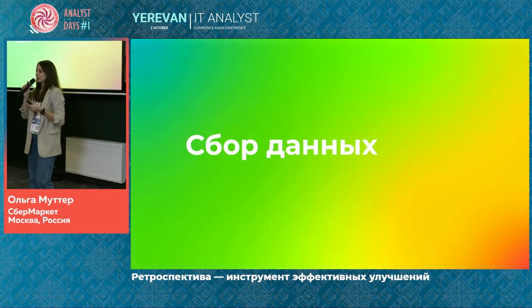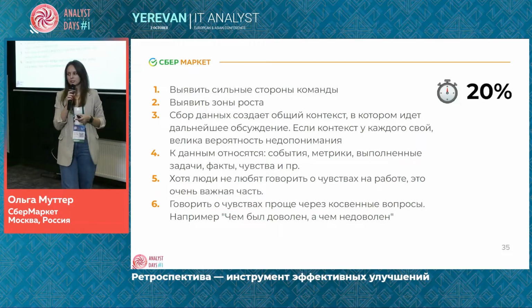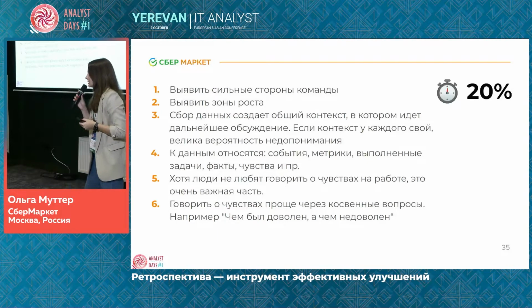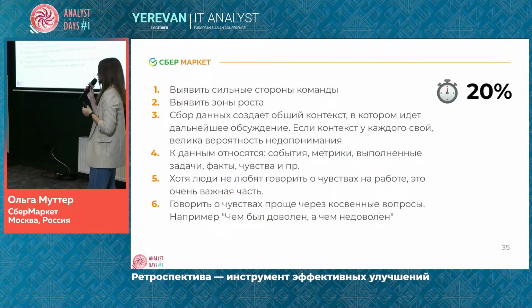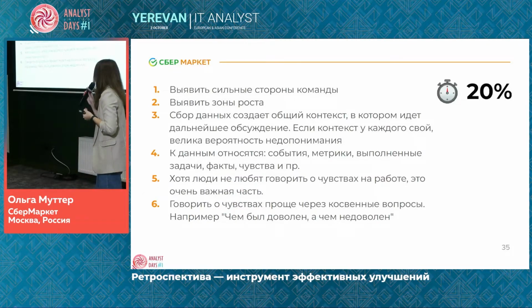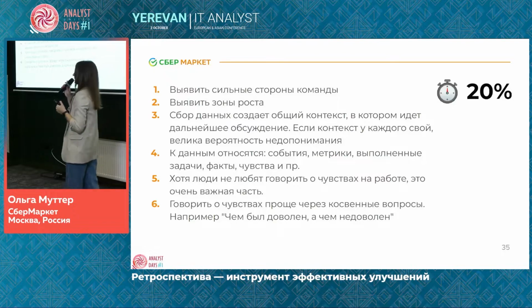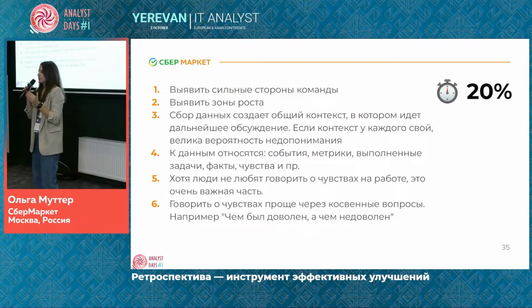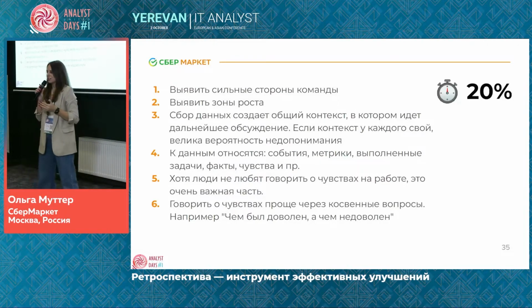Then you move on to the collection of data. How much does it take? It takes usually 20% of all the retrospective time. If we take, say, 1 hour long retrospective, you can calculate how long it will take. During the data collection, you identify not only the growth points, but strengths of the team.